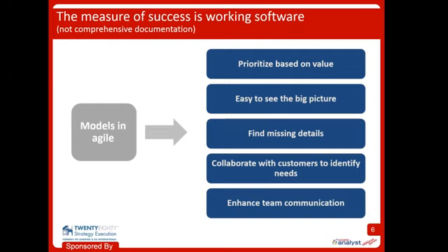All right, models also help us check to see if we've missed anything. So things like traceability help you find gaps in requirements, and maybe help you find requirements that you don't actually need. But traceability is not a word that I like, because I think it has a negative connotation for a lot of people. It sounds like a lot of work, but it's really, really valuable work. So call it what you want, but the point is we're going to link those stories back to how they add value. And then we're going to link within our models between one another to see if we can find any gaps in our information. We'll go through some examples of that here.